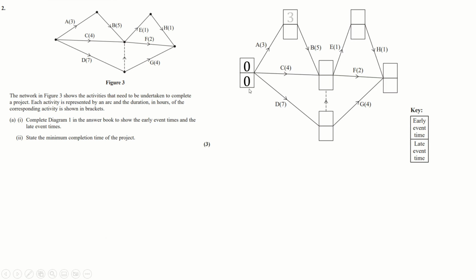So we start at 0, 0, and then the top numbers are the biggest number you can find to get here first. So obviously just 3 first, but this number here isn't 4, it's 3 plus 5, biggest number. This is just 7, it's the only way to get there. You probably should have checked 7 plus 0 before I put the 8 in, but whatever, it's still less than 8. So that's fine. This is just 9 because that's the only way to get there.